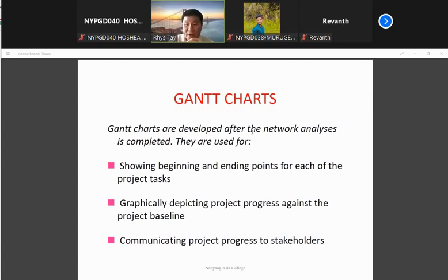Okay, prior to construction, the project manager, once they get the project, will sit down together with the QS, with the design engineer, architect to come up with the master schedule, right? And this master schedule is expected that all people should follow, rather than prepare this document just for show. No, right? So it's a way forward in every aspect of project management, right?